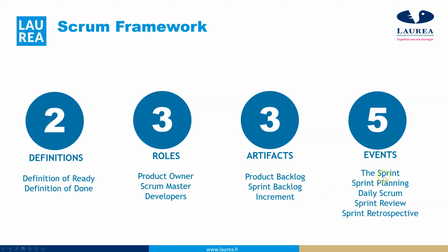Now, once the sprint is ongoing, you need to have a daily Scrum. The daily Scrum is mainly to find out what your team members are working on and what they have worked on. So basically it's yesterday, today, and is there any problem? What I did yesterday, what I will do today, and is there any impediment that I need help with?